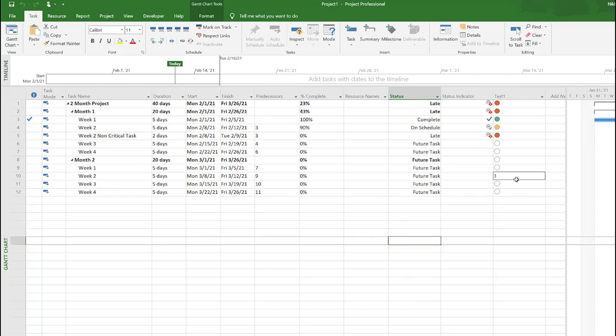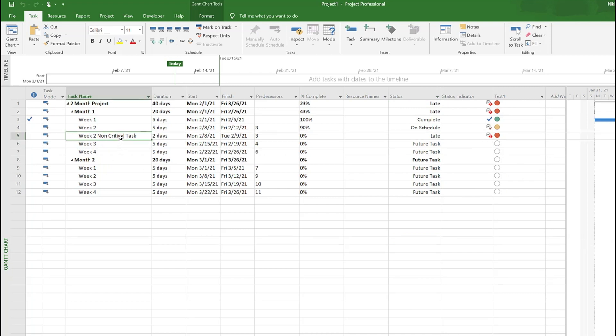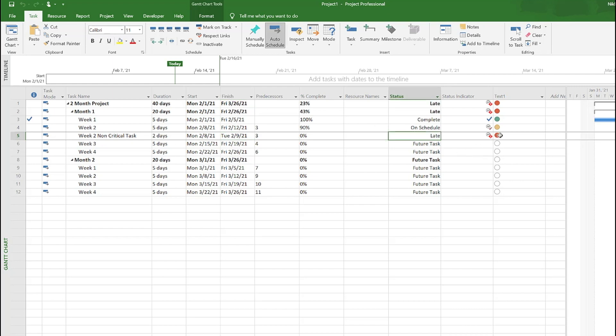But the only caveat here is, let's say this task is a non-critical task. It's not going to impact the project, so even if it's a late task it may be okay even if it's not completed as of the 9th because it's a non-critical task.